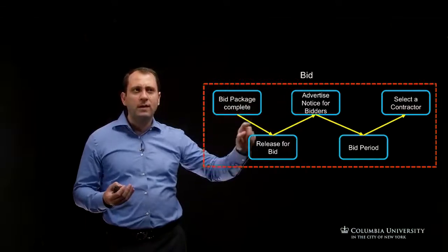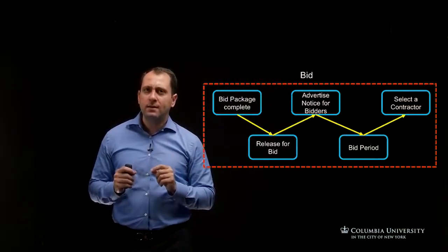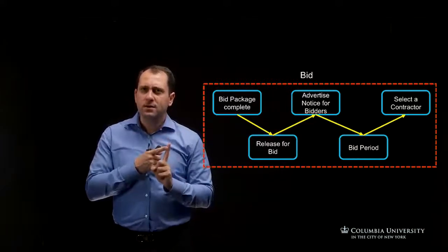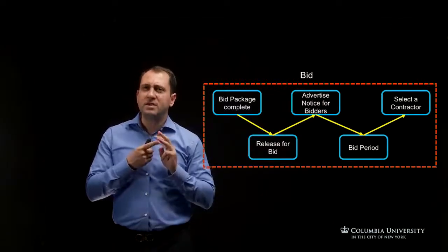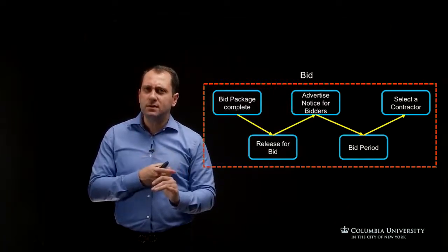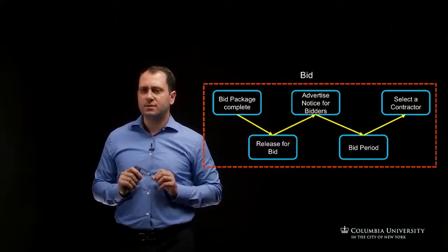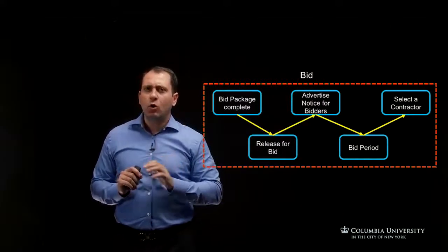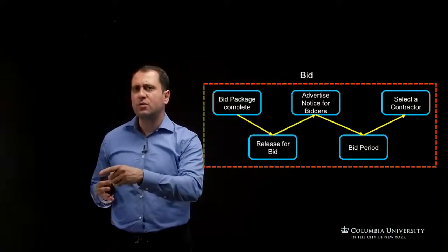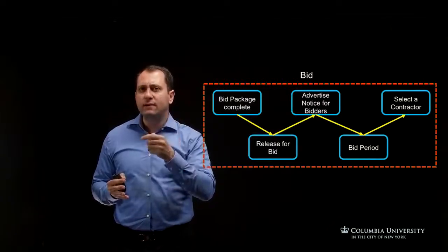And let me highlight what we mean by the bid package. Usually, what is included in the package are items such as the plans, drawings, technical specifications, proposal form, general conditions, and special conditions. Let me highlight what we mean by general and special conditions. General conditions usually cover all common procedures to construction contracts, and special conditions provide more detailed information for any unique items for a given project.